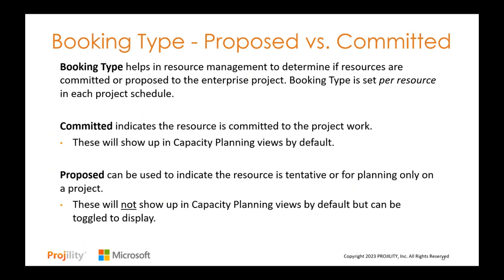Proposed assignments or proposed resource work will not show up in the capacity planning views by default, but you can toggle it on if you do wish to show the planned work so that you can overlap your committed work with that planned or proposed work as well.